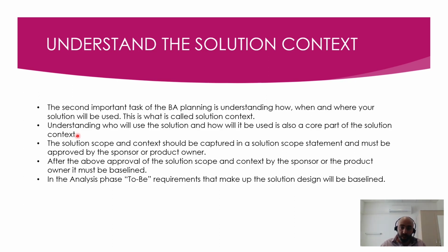Sometimes you deliver a solution, nothing wrong. The chair is perfect, is excellent, no problem. But because of improper understanding of the solution context, in other terms, the solution environment, the surroundings, that project will result in rework, extra cost incurred, and changes.